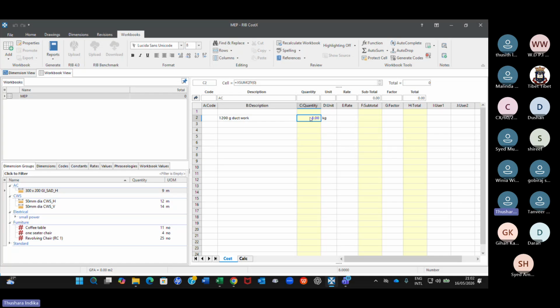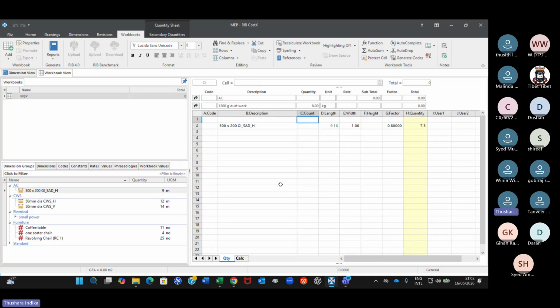And if you go to the next measurement level, this is what we did. We assign the girth here, knowing the length. Then if you want, you can apply the factor kilograms per square meter, then you get it in kilograms. If not, you get it in square meters. I hope everything is clear.